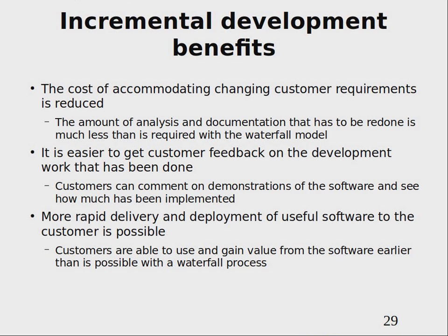If something goes wrong, nothing very bad happens, because it doesn't kill anybody, the system does not completely crash, money is not lost, etc. So remember that if your application is not very critical and failures can be handled somehow and dealt with, then these incremental approaches are very good. Then you gradually just improve something.